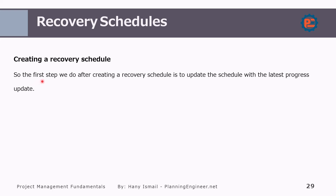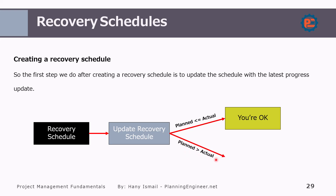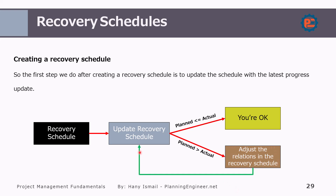The first step after creating a recovery schedule is to update the schedule with the latest progress update. This is a very important step to do before submitting your schedule for approval. If after the update the plan percentage is less than or equal to the actual, then you are okay. If the plan is more than the actual, that is not a good scenario — you need to adjust the relationships in the recovery schedule and check again.